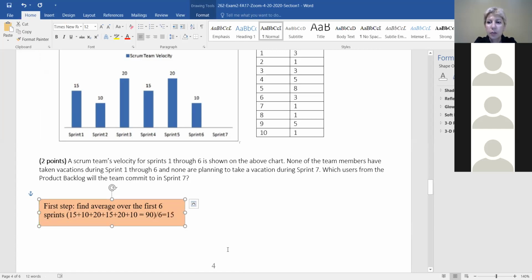because this is agile, you're gonna trust your team. Make sure you understand what they're able to do. And the best thing is to have a look at their history and what they've accomplished. This is showing their velocity, the number of story points they completed during the past 6 sprints. You're going to take the average and you're going to use that.